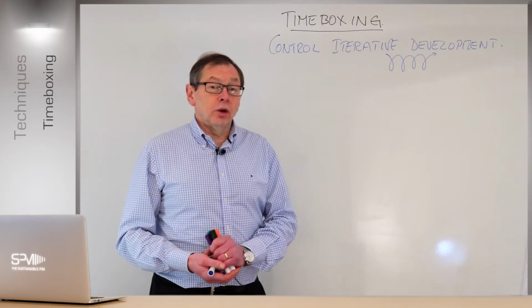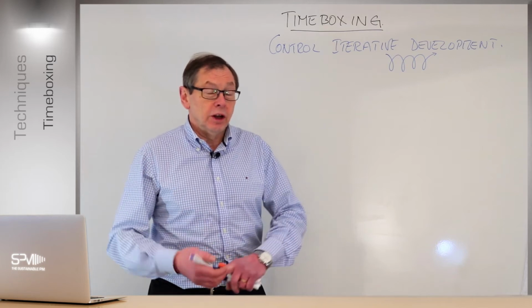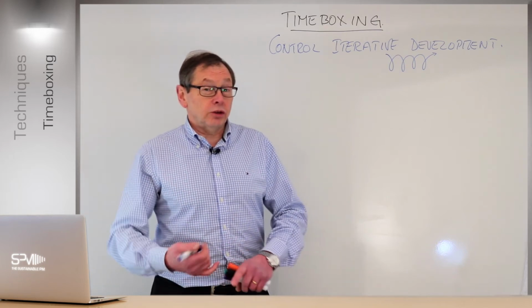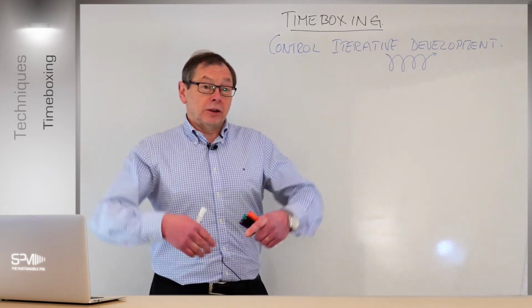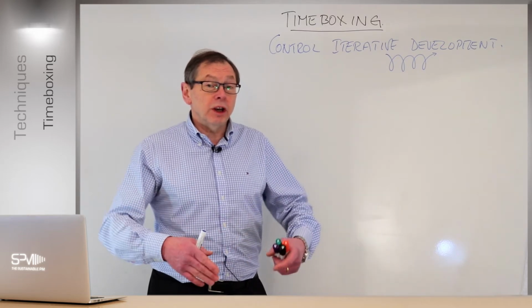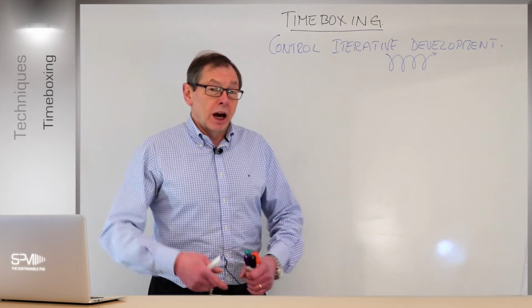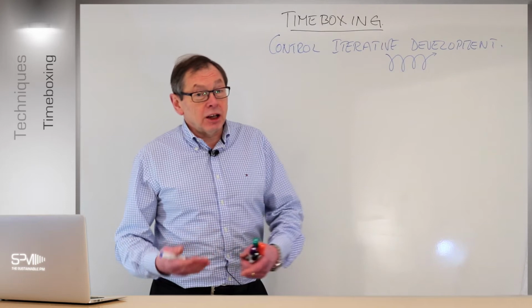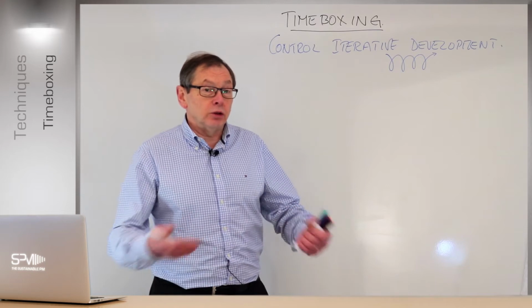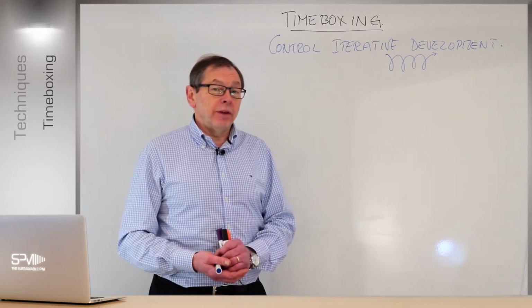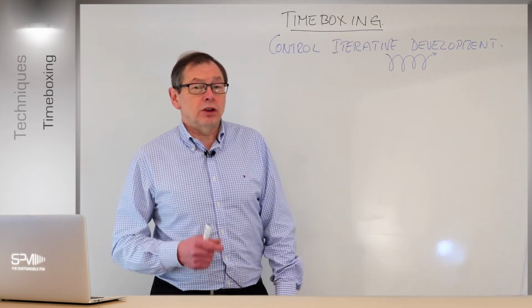And if you've had a chance to look at the session we did on the old iron triangle, if you look at the 6 parameters, the things we have to control through projects, of course, time and costs are the 2 critical ones, followed by quality. Right? Because time is of the essence. Time in projects is more of the essence than anything else, because quite often I've got to meet a certain deadline. And of course, often if we go over time, it actually impacts on the cost too. Now, as we said, you can impact on the cost without going over time by adding resources. And that has an impact on the investment of the project. But quite often if it's time critical, then that's where we really need to watch out.